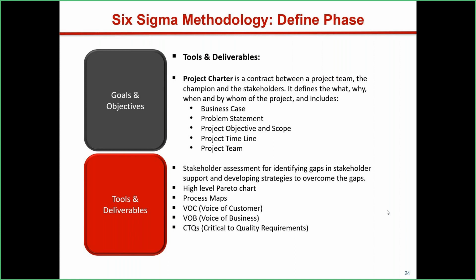So we'll see how a RACI matrix is built, and how it helps to sort out problems at larger levels when people are involved in a project. Because if we don't know who is responsible, accountable, consulted, or informed for a given activity, it becomes difficult to move the project smoothly further. So we will see how it is created and how it can be made.